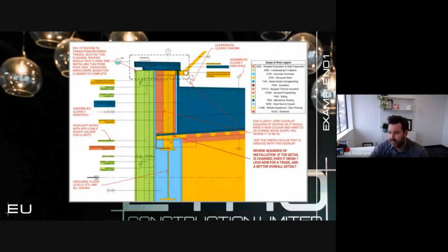So as far as some details, I've gone through and marked up a typical roof parapet plan. So as you can see, as far as this complete level of detail, as far as where this detail occurs, level 3, grid line T, all the assemblies seem to be tagged. You've got detail callouts where they're typically provided. All the minimum notes and small clearances are provided within the details, so relatively complete.